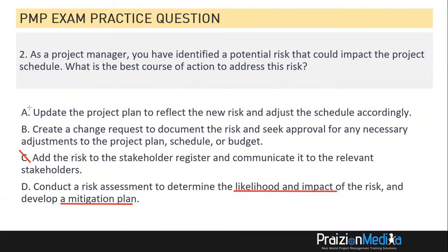This is a little bit presumptuous and also incorrect because we don't reflect risks in the project plan. It would be in the risk register. That would be the best place. So let's take a look at B. B says, create a change request to document the risk.